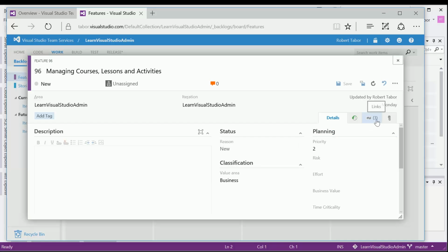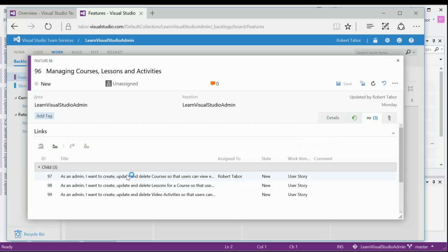You can break those down then into what are called user stories, or just stories. And a story takes a different format. It's more of like a script that one of the users of the system would be walking through to complete a task in the system. So it usually has, as an actor, I want to take some action so that there's some end result.